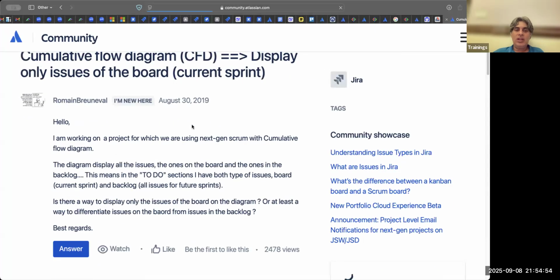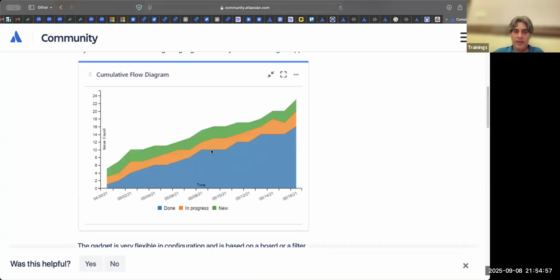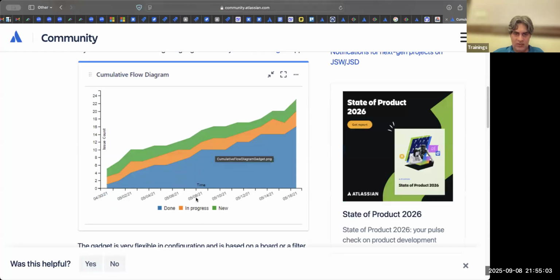Cumulative flow diagram is a diagram which tells you the flow of tickets in your team, and it has 3 bands, and those bands, if they are steep and they are going in the upward direction in parallel, then it is fine, no problem. See, this is 8th of May till 10th of May. There is a flattening line here. Flat line. When there is a flat line, see, this in progress band is thicker now, because things are not getting done because they are piling up here.